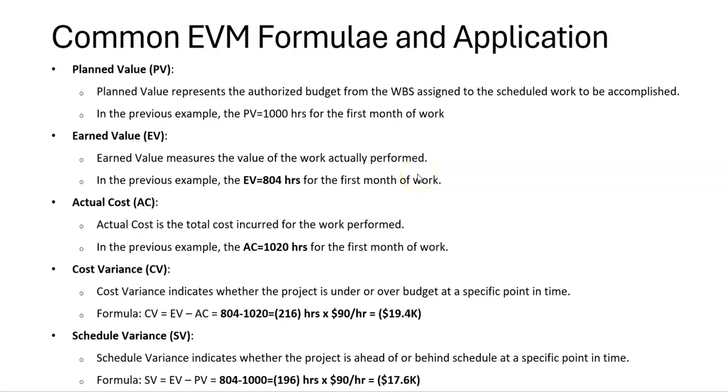And the reason I'm doing this for the first month of work, because that's typically the reporting period on earned value, either to the corporate executive management or to the customer, or both. So we're doing this based on the first month's report.